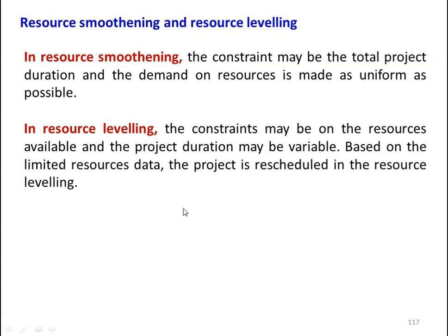In resource leveling, the constraint may be on the resources available. For example, the number of manpower available or number of man hours available is restricted. In that case, we can change the project duration — the project duration may be variable. Based on the limited resources data, the project is rescheduled in resource leveling. So in resource smoothening the project duration cannot be altered; we have to adjust the requirement of resources. In resource leveling, the availability of resources is restricted, so we can extend the duration of the project work.